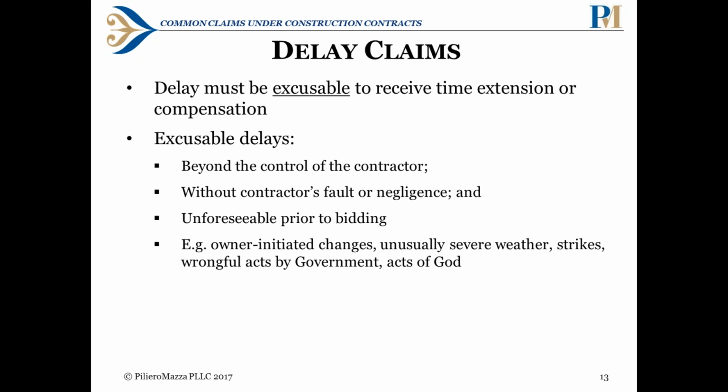Now, unusually severe weather is weather that is abnormal compared to past weather at the same location for the same time of year. And you need to be able to show the weather had an adverse impact on critical work. If it's pouring outside but all of your work is inside, it's going to be harder to show that that weather affected your ability to perform. Some contracts will contain a clause that sets a standard based on historical trends, where there's blanks that either the government or the offeror fills in for how many days of snow or rain there are, and that sets the baseline. And if you experience more than that, there's a presumption that a delay occurred.